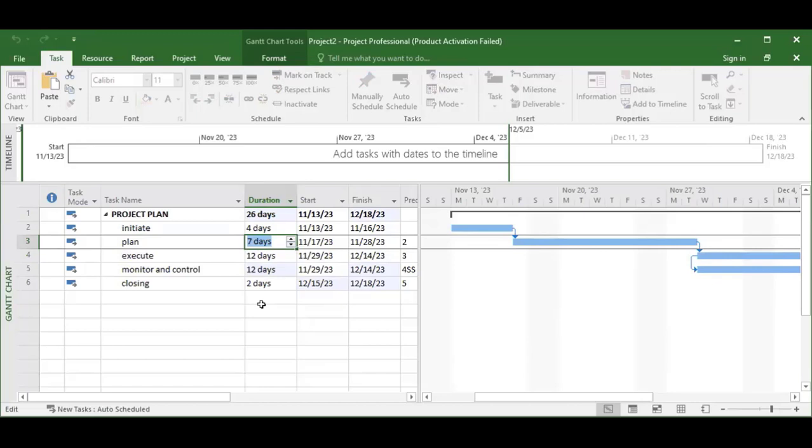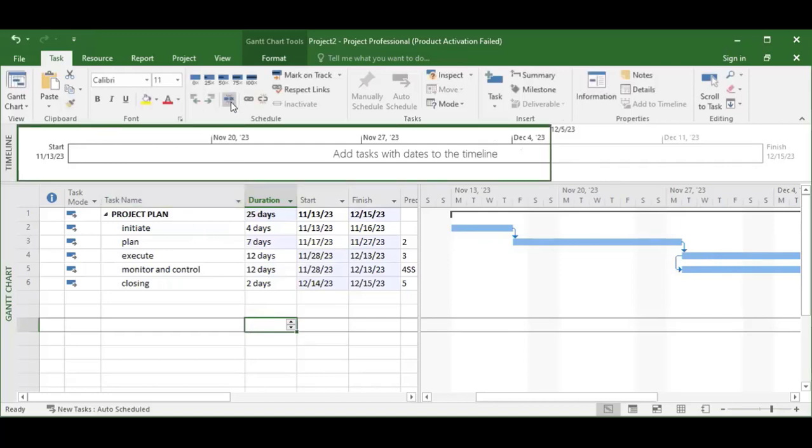When you reduce the duration, you put in enough resources, the manpower, the material, at times the equipment that you want to use, all right? You should be able to achieve the scope of that work. The scope is not going to change. It's just the resources that you need to achieve it. That is what you need to work on. All right. So that is that about linking.